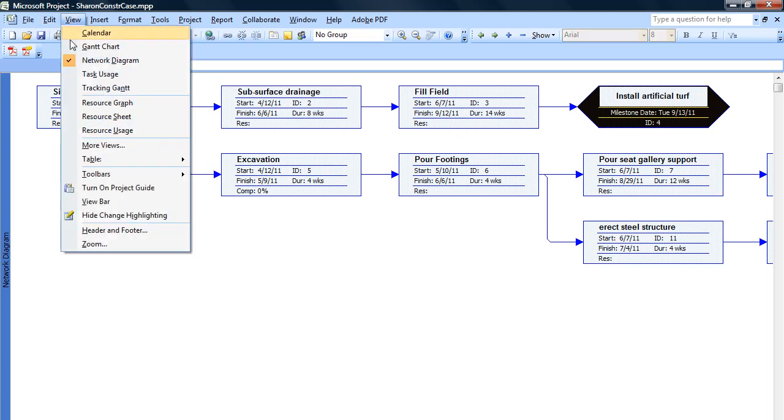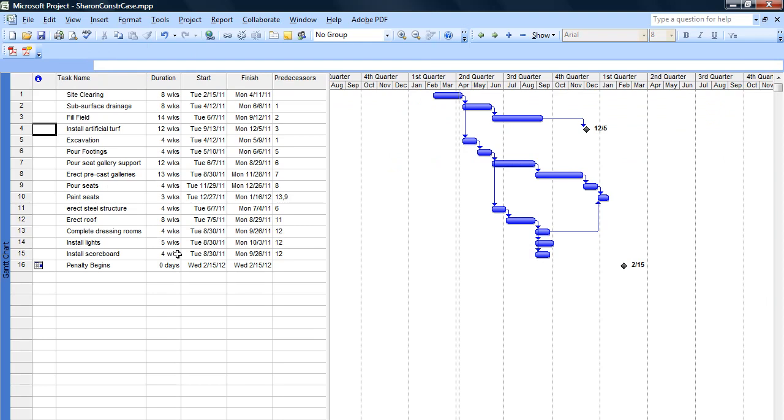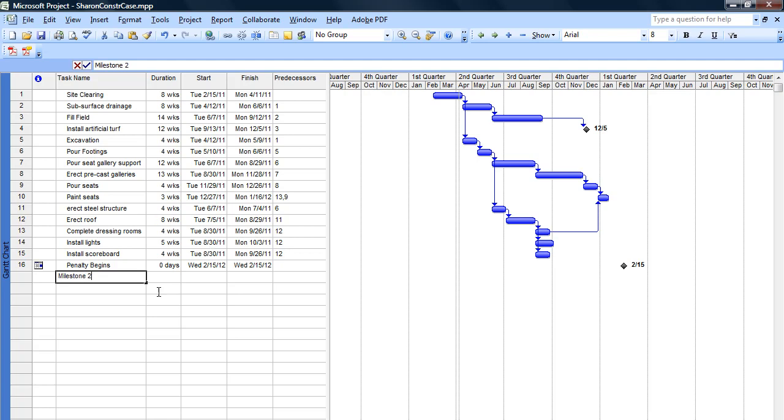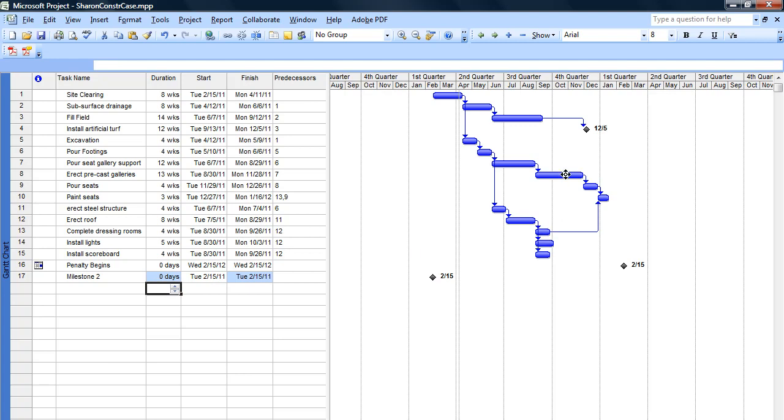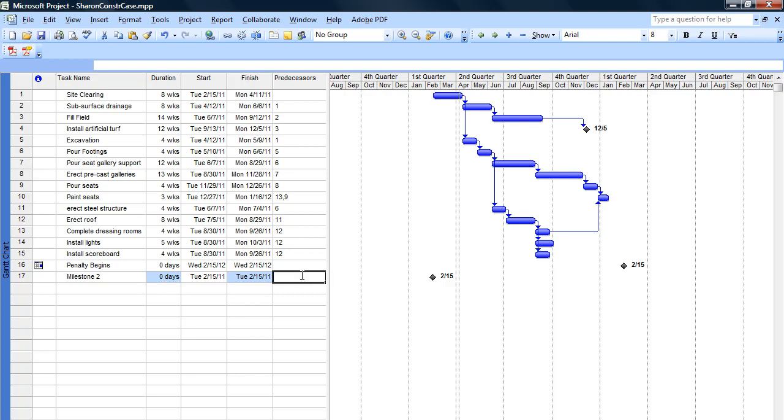Now the other option for creating a milestone is to actually create a specific milestone, and I'm going to create one called Milestone 2. By definition, a milestone has a duration of 0, so I'm going to set that as 0d, 0 days, and then I can set exactly when that will occur, or I can attach it to a specific activity. What I'll do is I'll say after task number 8 is completed, so a precedent of number 8, that milestone will occur.